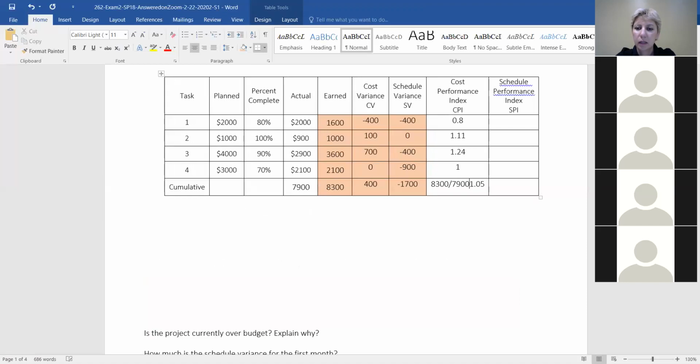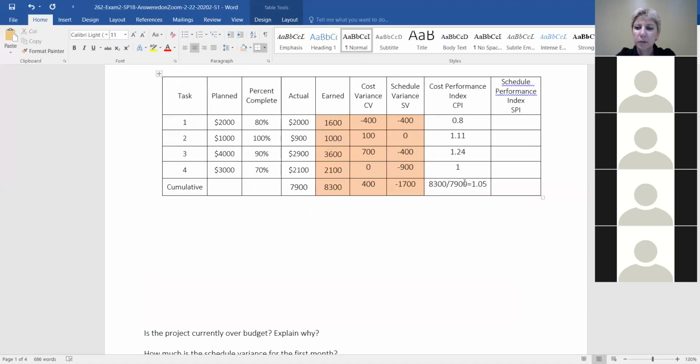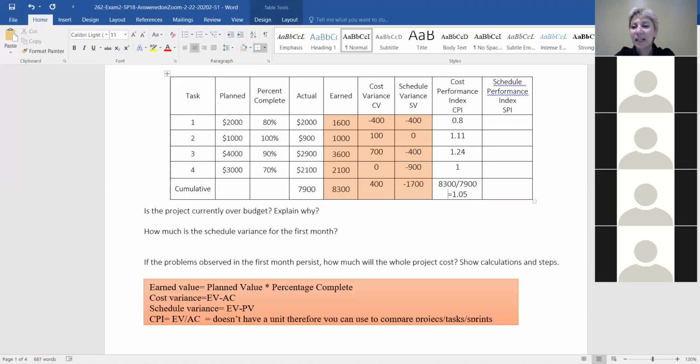Thank you, Nick. So in terms of budget, are we getting more value for every dollar spent during the first month? Yeah, we're getting $1.05 worth of value for every dollar we spend. Thank you, Nick. That's great.